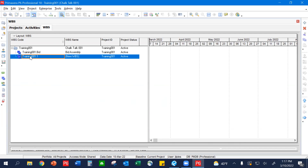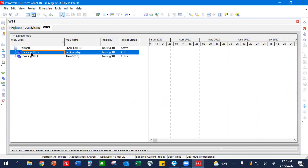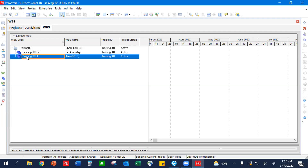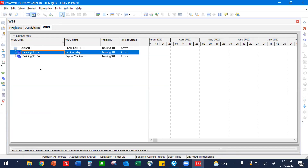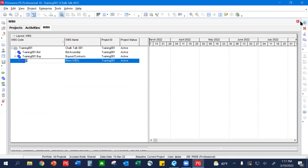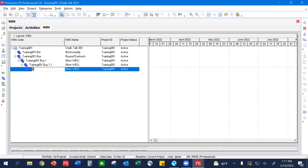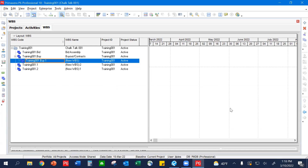When you hit Add, the next bucket will be under the Bid Phase — and that's not necessarily where you want it at this point. How you change that is back over on your right-hand side, down here there are four arrows that will manipulate where your next WBS lands in the scope of creating the overall project. What you want to do is come over and hit the left arrow, and what that does is take it and move it from inside this WBS to inside the entire construction level. Now you've got the next phases of the process. Let's call this one Buyout — this is where we're going to do buyouts and contracts.